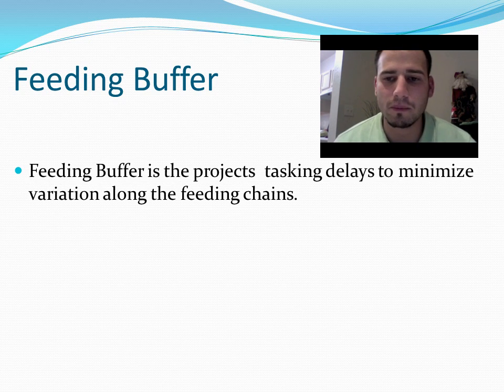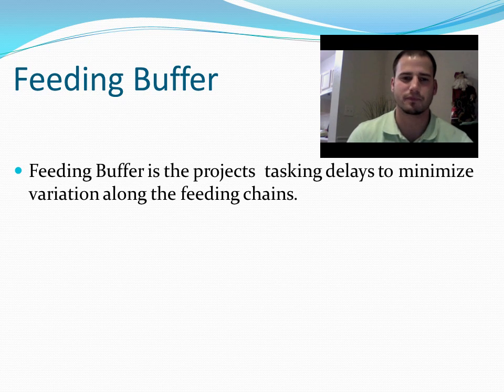The feeding buffer is a buffer that is present at a task level. It helps to incorporate a buffer within the chain to allow for longer time and effort not accounted for in each particular task. For example, an engineer might take longer to design than a machinist to machine, and thus their buffers should work together to maintain the project schedule.